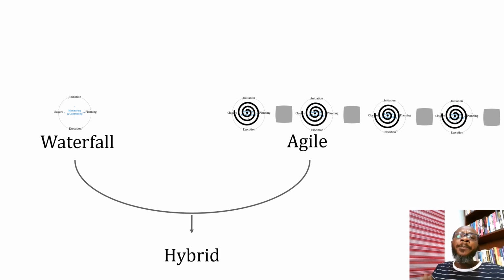So we want the project to be broken down into components, and then the trial and experimentations will happen component by component. As soon as we get the results we need for one component, that component is released to the client. That component is released to the business, and then we engage the next component.